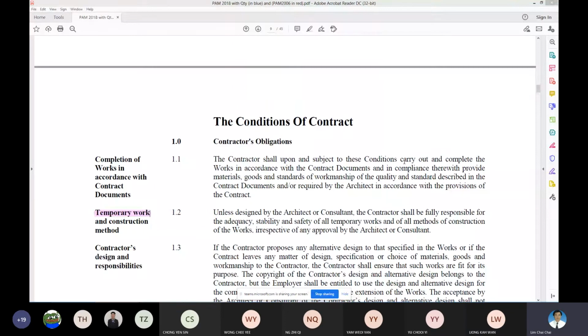So you can see under the conditions of PEM 2018, are there any clause or subclause available for the contractor to carry out the design? Generally, you can see PEM 2018 is a hybrid contract, where it is not 100% pure traditional. Because if it were 100% pure traditional, this clause wouldn't be there. Any temporary work design, the consultant would take over, but this one, no.